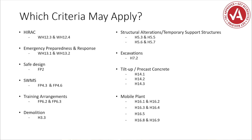For excavations, we need to ensure we're not setting up near excavations without appropriate sign-offs confirming that ground conditions will support the loads imposed. If setting up near an excavation, it may require additional shoring to ensure loads will not affect or collapse the crane. For precast tilt-up, it's about making sure we've identified the associated risks — someone's done planning about where panels are going, we've done an appropriate lift study plan, and we have safe systems of work looking at the correct erection sequence so we're not going back and forth unnecessarily.